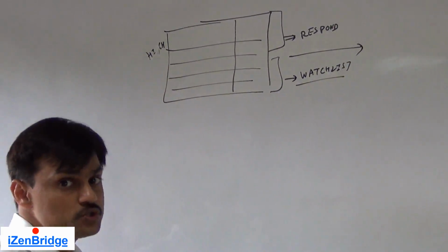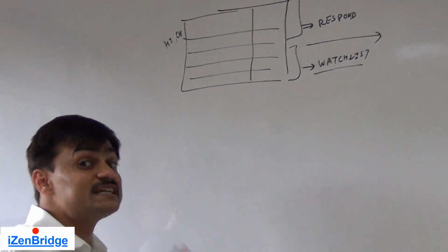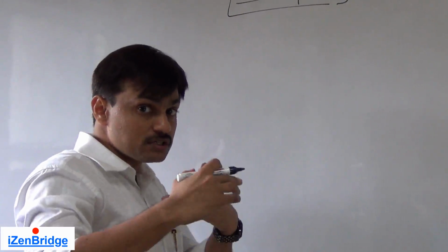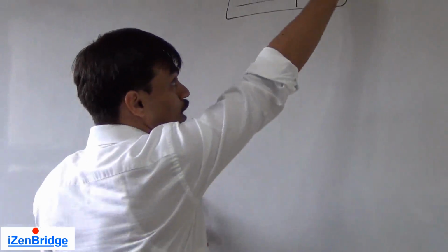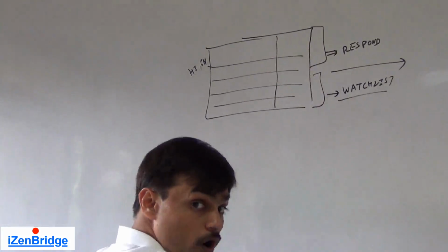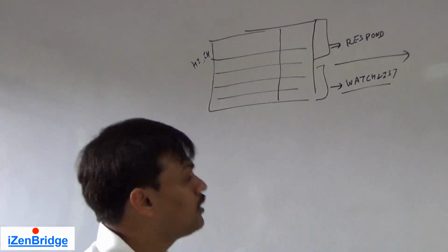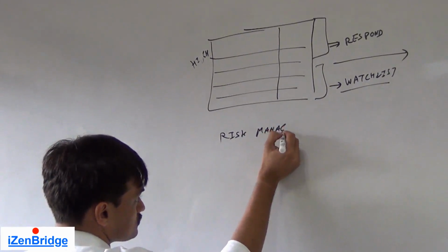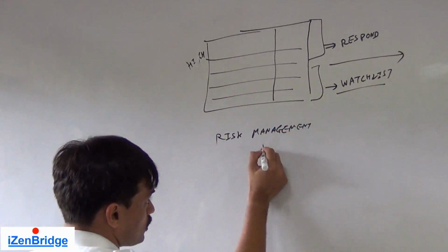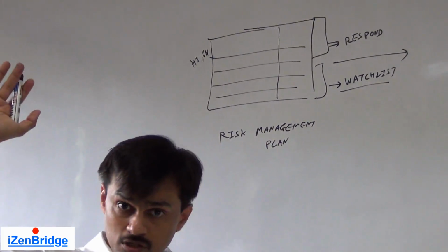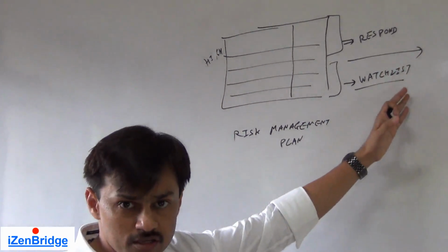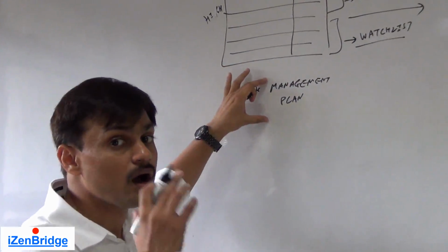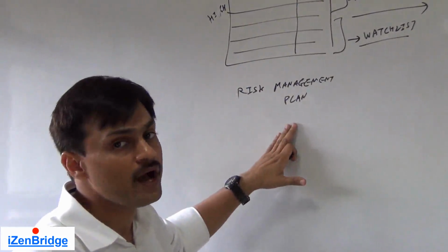And how are we going to respond to a risk? What kind of strategies are available in this particular project? What threshold should you use in order to identify a watch list and a risk to respond to? All these things are documented in the risk management plan. So remember, if you are a big project manager and multiple people are doing risk response, you control their way of doing things by telling them the approach, which you communicate via the risk management